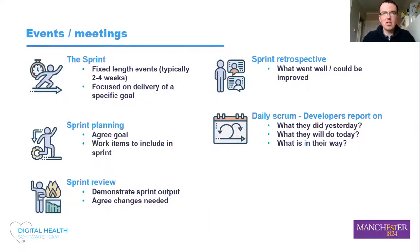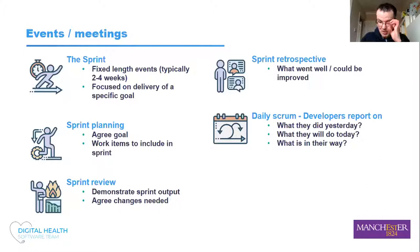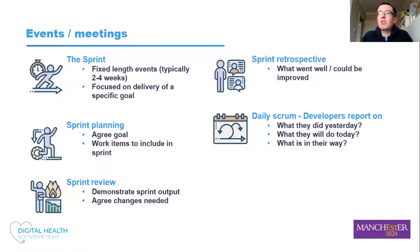Moving on to events or meetings: the Scrum sprint is the planning unit for Scrum. It's a fixed-length event, typically two to four weeks. In my team, we normally use three weeks, which we've found is a balance between being able to respond to changing requirements within a reasonable time, but also giving us enough time to deliver something useful within the sprint. They're focused on delivery, ideally of a single specific goal, sometimes a couple of goals.